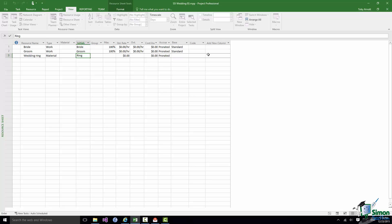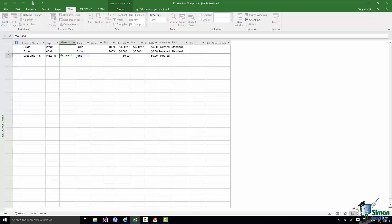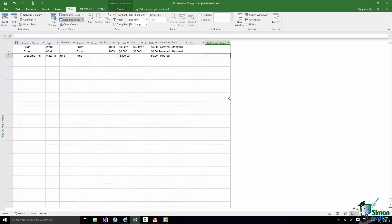When you're dealing with costs for materials you also declare what units the cost refers to. So if instead of wedding rings I was dealing with building bricks I might record a cost here for a thousand bricks. What I would put here in the material column might well be a thousand for a thousand bricks. For the price for a ring will be a price per ring. Let's suppose that the price I'm working on here is $500 per ring. And that is all the information I need to set up that material resource. So at whatever point I decide to buy one or more wedding rings in my project the cost will be recorded in the project as $500 per ring.